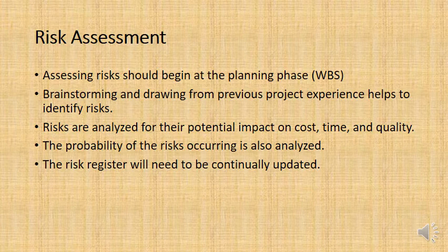Now, this will first be written at the planning stage, but the truth is the risk register will always be continuously updated, similar to estimates, which are always refined as you go through the project. The risk register is continuously being updated.